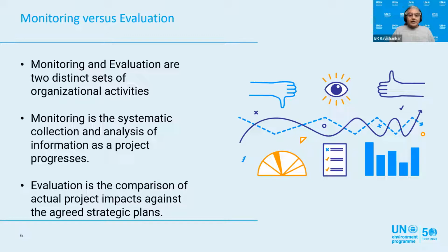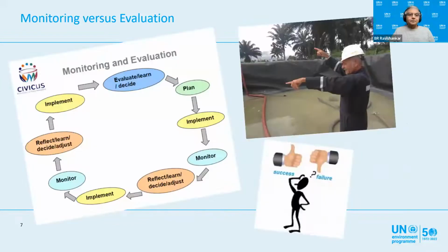Sometimes, right in the beginning of the project, you would decide how frequently you would do an evaluation. In other words, it could be an interim evaluation halfway through the project, or if it's a very long project, you would do the evaluation on a periodic basis, so that you have the checks and balances in terms of the impact of the project.